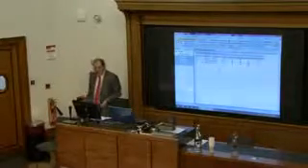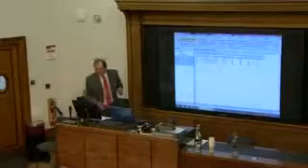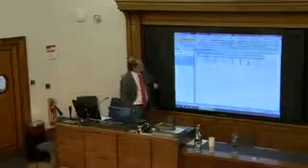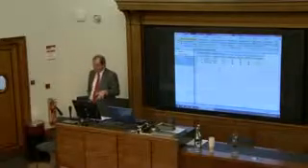And here I've got a baseline project, 2 progress updates, and a new baseline. And I can see that in April, there were no new activities. And then suddenly in May, there's a new activity called risk analysis. And by the time I come to my new baseline, 3 activities have been added.